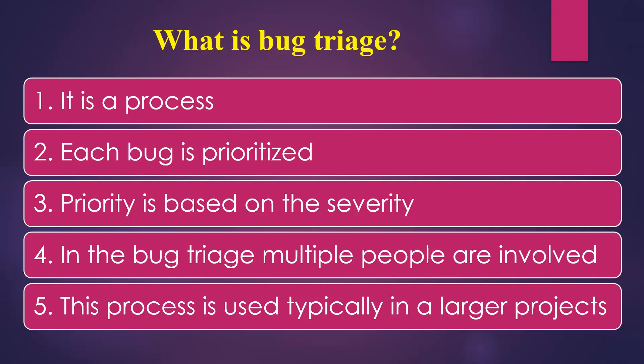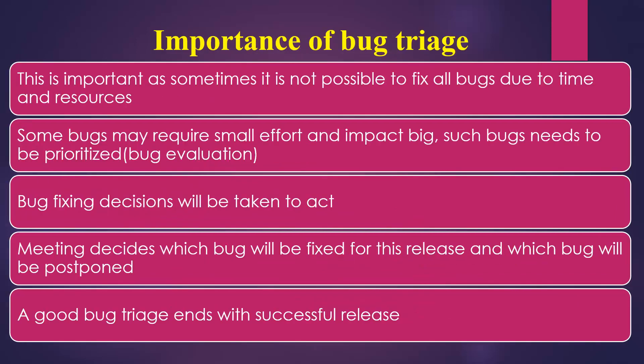In the same way, when it comes to software testing, whenever a major release or sprint review is happening, QA will find many bugs. We have to prioritize which bugs need to be resolved quickly — that is when bug triage comes in. Bug triage is a process wherein the team reviews all known bugs and each bug is prioritized based on its severity. Multiple people are involved, and this process is typically used in larger projects.